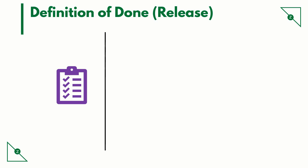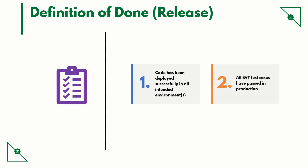Here are some pointers for definition of done for a release. Code has been deployed successfully in all intended environments. All BVT — Build Verification Testing — test cases have passed in production.